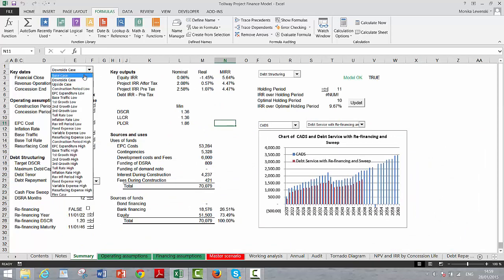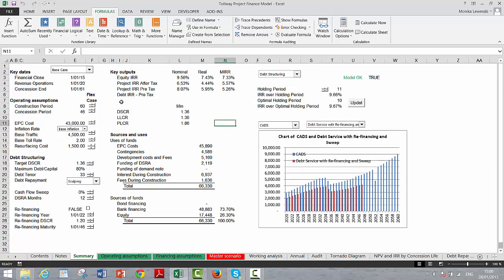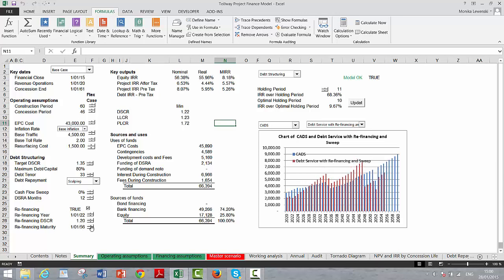You can change the target DSCR and see what happens to the financing. We have some bond financing and some bank financing. There's a cash sweep, and we can put in a refinancing — though this refinancing didn't work. We'd have to stretch out the maturity a long time, and we'd need a higher coverage ratio. Let's take that refinancing off since it didn't work.